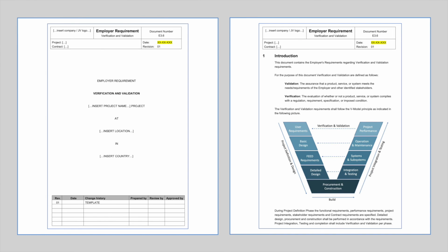The contractor shall follow the so-called V model for the verification and validation of all the requirements in line with the requirement breakdown structure. To manage and demonstrate that all requirements are fulfilled, the contractor shall use so-called Requirements Management Software, RMS.